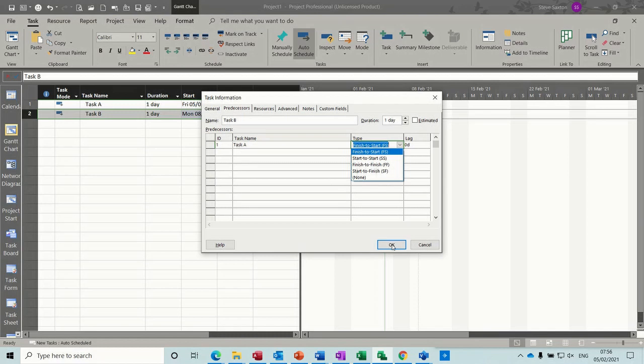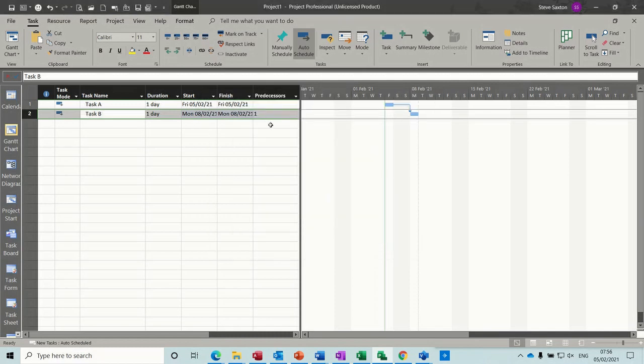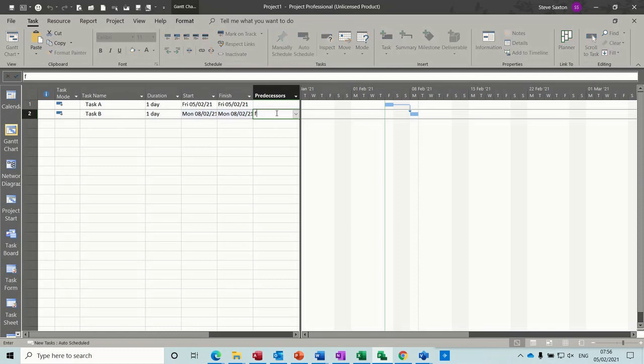So if I click OK to that one, what I would have to do to put a one-day lag on here, I would have to go 1FS plus 1.